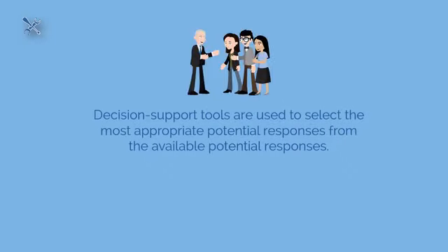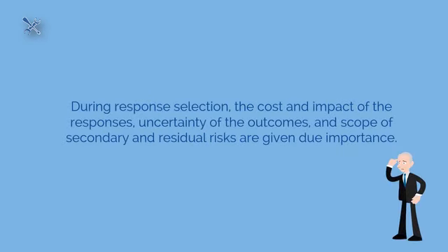Next is the response selection technique. Decision support tools are used to select the most appropriate potential responses from the available potential responses. During response selection, the cost and impact of the responses, uncertainty of the outcomes, and scope of secondary and residual risks are given due importance.